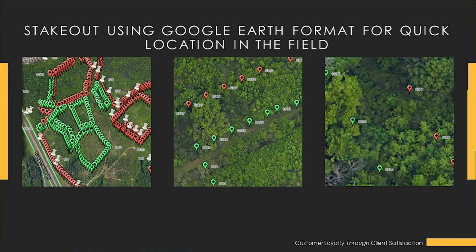So they're really getting a daily update of real-time operations, so they know, okay, I'm out far enough, or they're out far enough in front of me. The clearing crew or erosion control crews can't catch us. I can call them in and get them started.